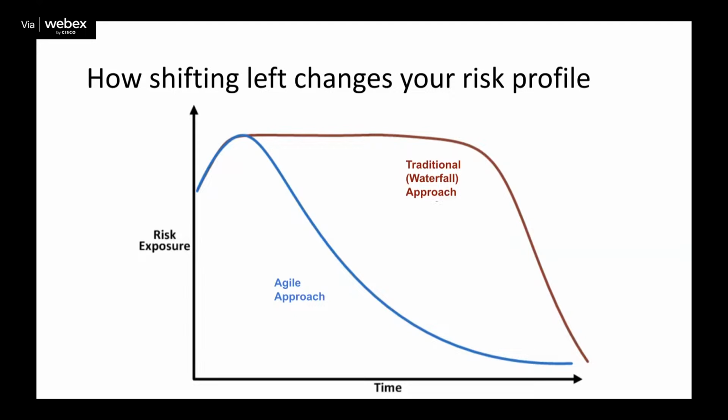And they actually built a whole risk liaison team to work with product owners to make sure that all of the risks identified had some kind of control in place in the backlog. And it's very collaborative and proactive. And it's enabled that organization to deliver products much more quickly than they could in the past, when risk would be identified kind of throughout or at the end.